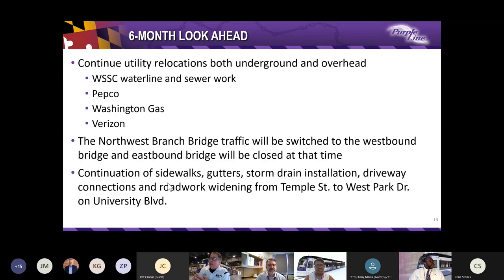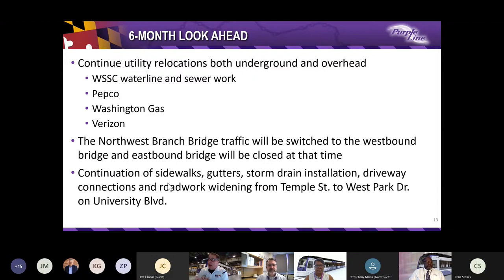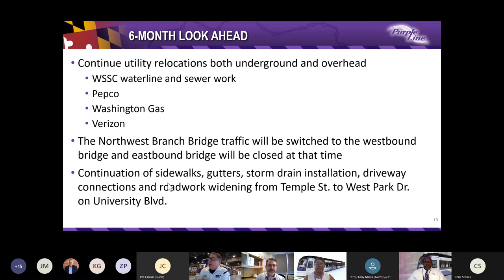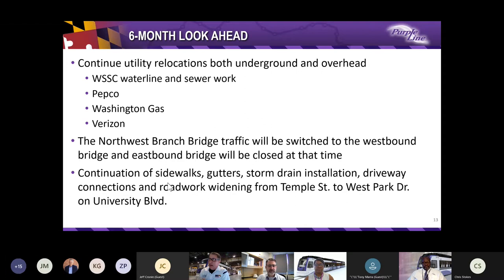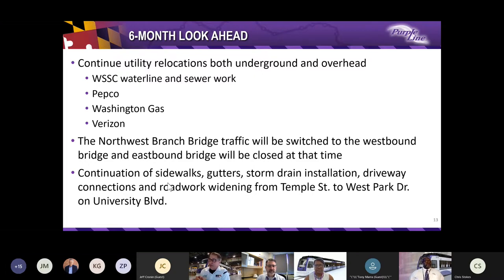Now, to give an insight on our six months look ahead of what we plan to do, we're going to continue utility relocations, involving our utility partners WSSC, Pepco, Washington Gas, and Verizon, to name a few. Also, the traffic on the Northwest Branch Bridge is going to be switched over to the westbound bridge, and the eastbound bridge will be closed at that time. In addition, we're going to continue to work with sidewalks, gutters, storm drain installation, driveway connections, and roadway widening from Temple Street to West Park Drive on University Boulevard.